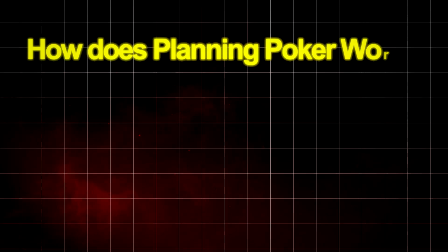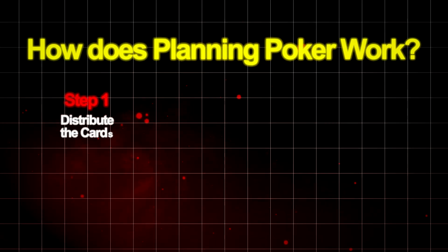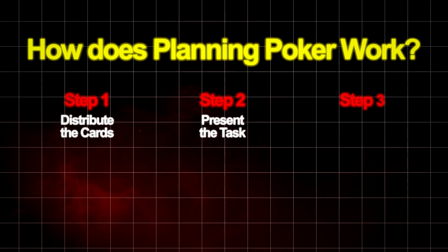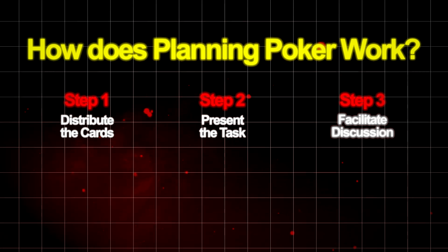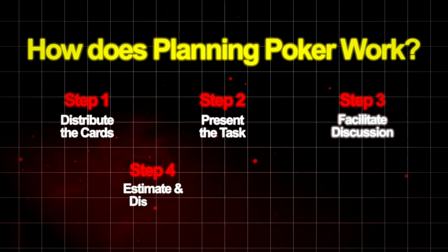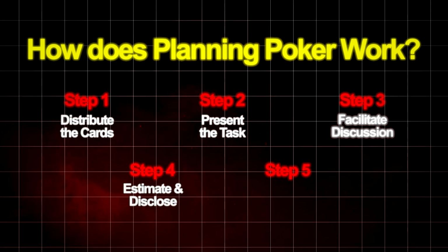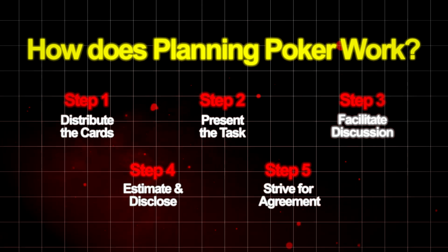And if you're working with the team, try planning poker. Everyone throws down their estimate for, say, the testing phase, and you reveal them all at once. If someone's way off, you chat about why and settle on a number together. It's a fun way to get everyone involved and get better estimates as a result.